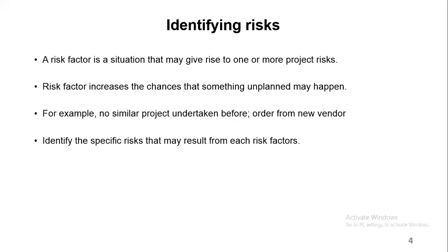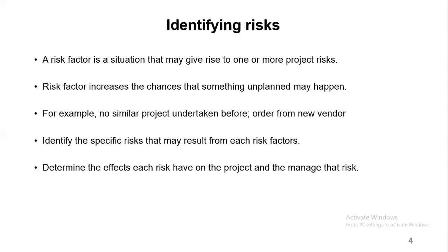Okay, so when you're identifying the specific risks, you need to start by looking at the risk factors first. And then you need to determine the effect of each risk that you have identified. What will be the effect of that risk and how will you manage it?